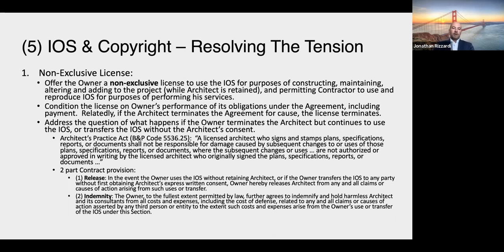So if the owner violates your agreement and retains another architect and uses your instruments of service, you should have a release from liability from the owner, and the owner should step into your shoes and indemnify you for any claims by any third parties relating to that improper use of your documents. So that's what I think of as the default.